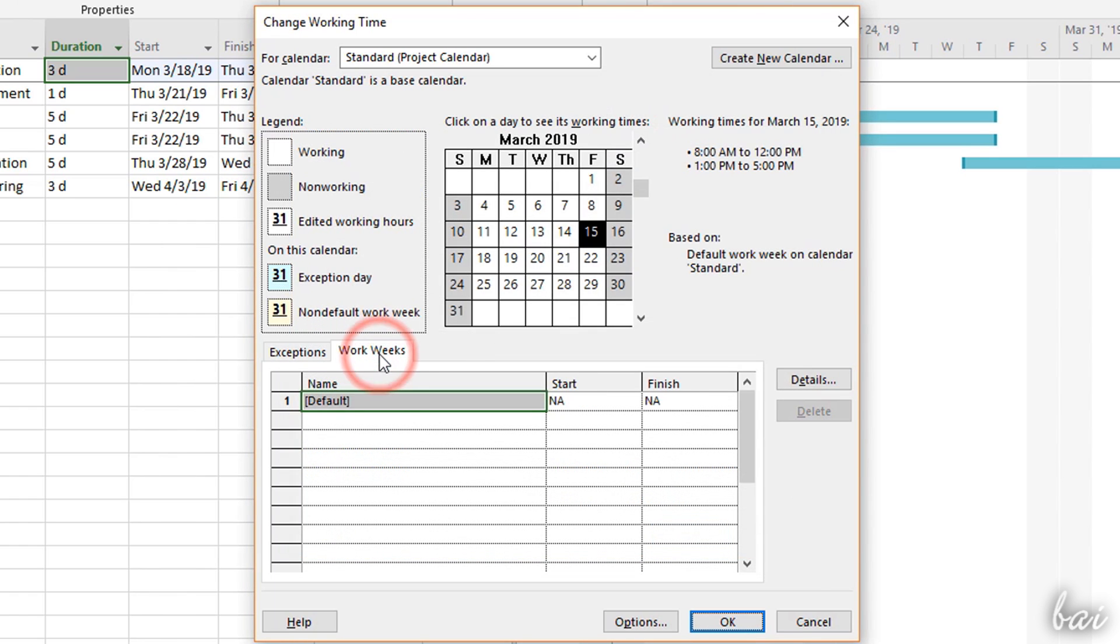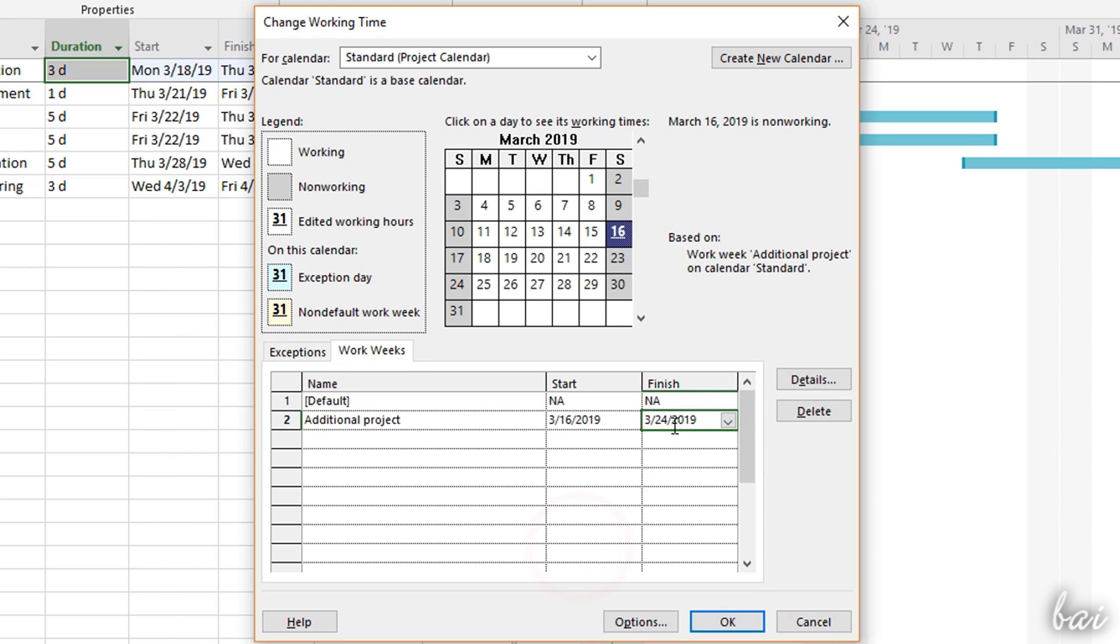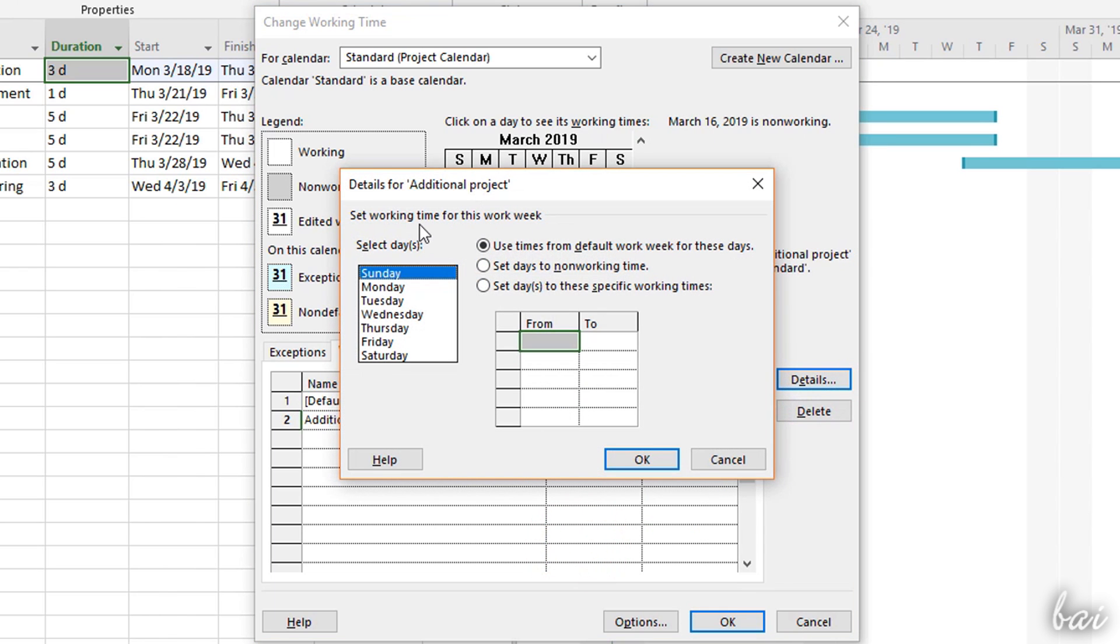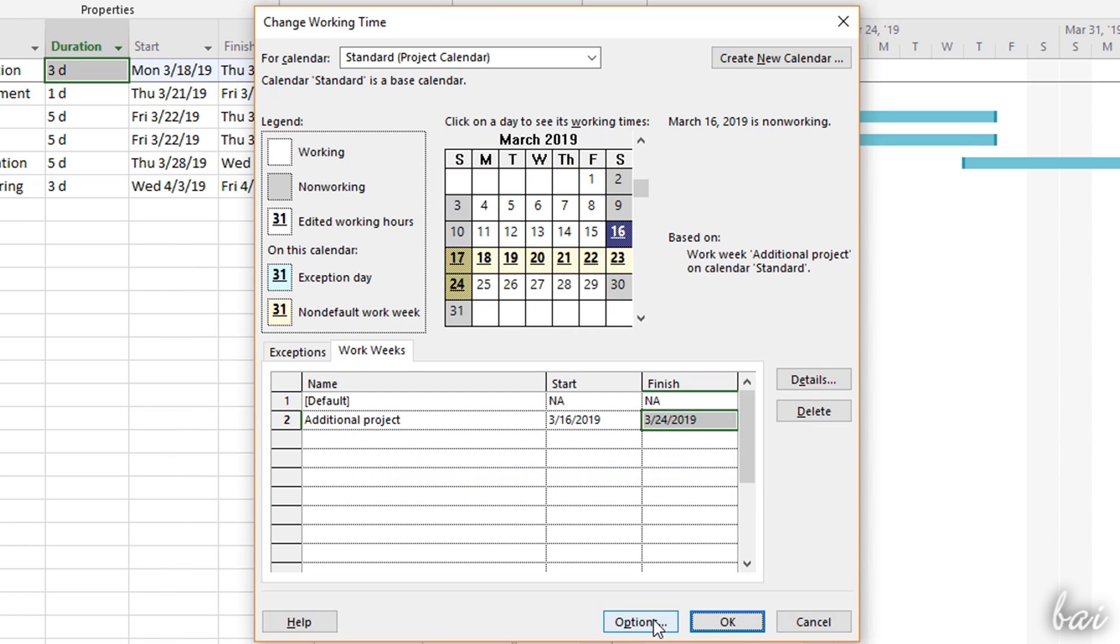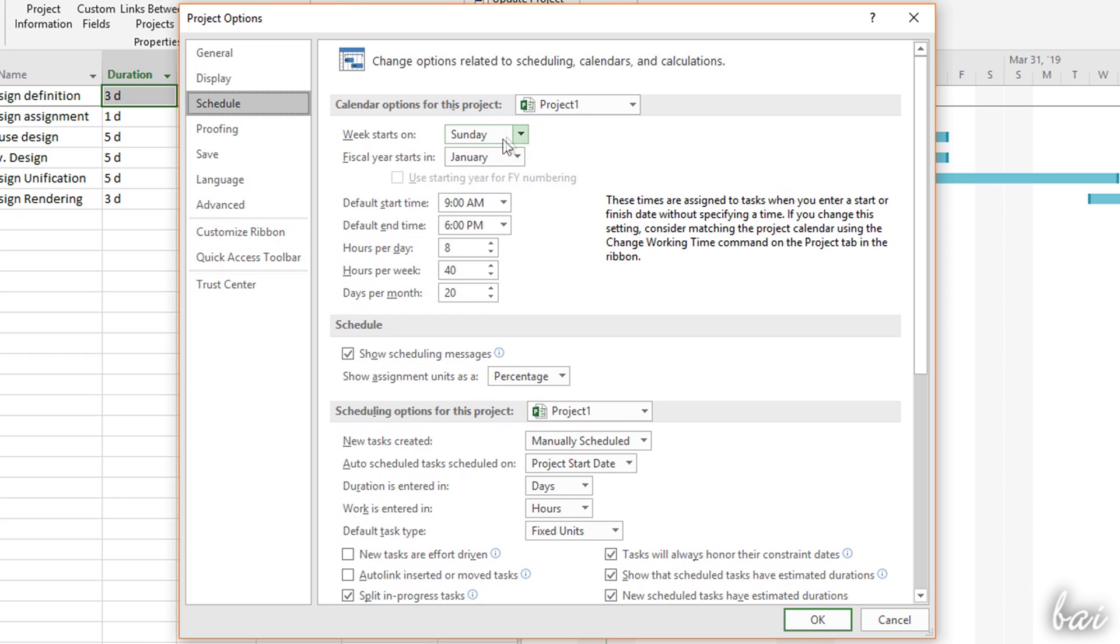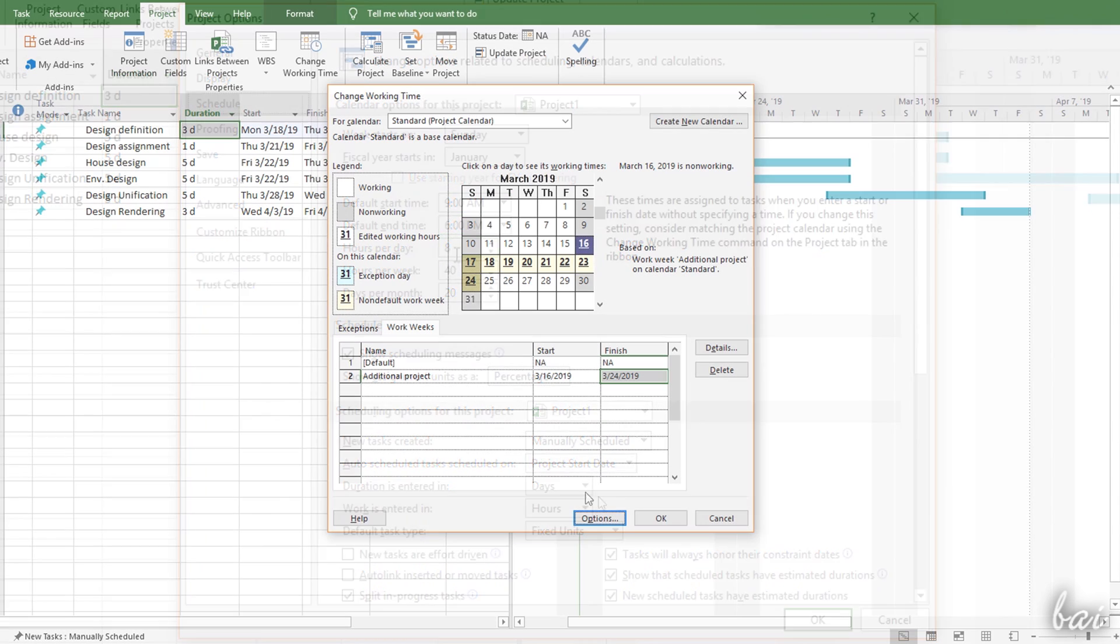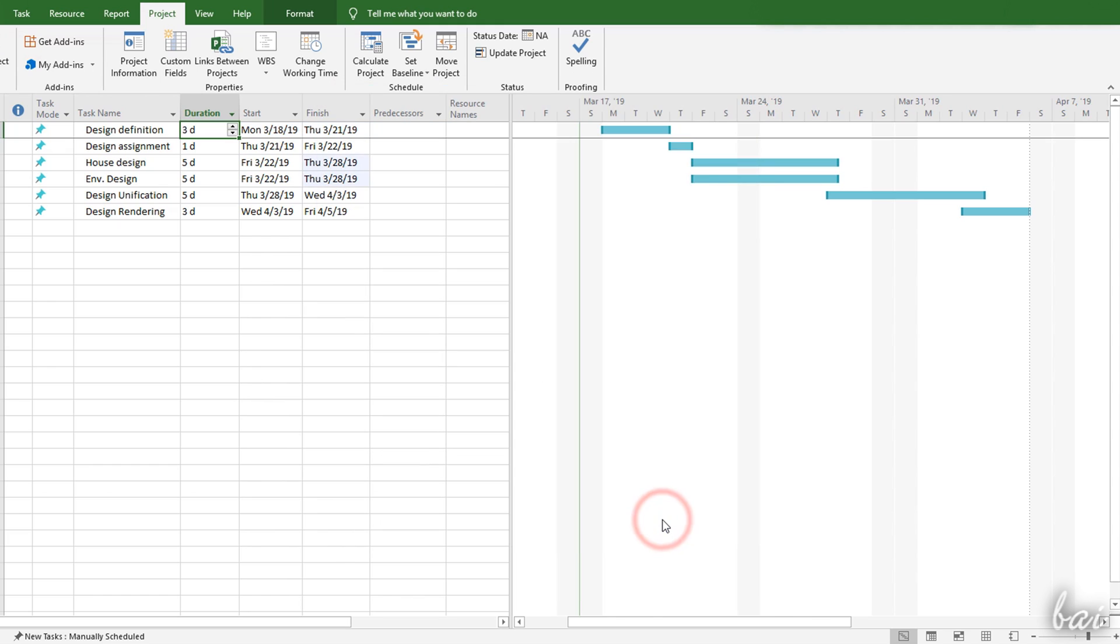Under Work Weeks, you can specify periods of time where the working days and hours change or become non-working days. You can also go to Options to change the ordinary working hours and times. Once you go to OK, the Gantt chart updates with your changes, adding or removing gray columns.